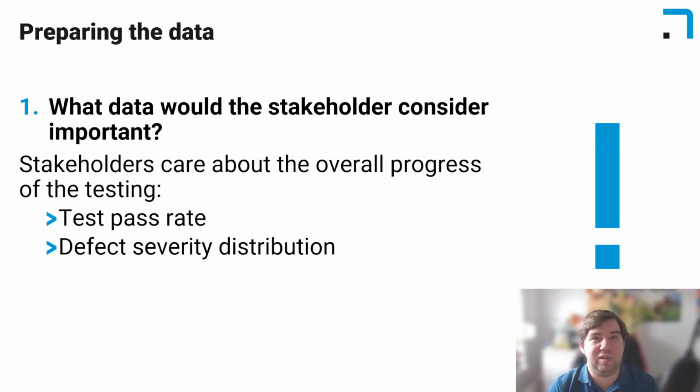Where are the defects located? You could have one section that has a variety of lower priority defects. It may have 20 defects, but they're all at a low priority, so we can worry about fixing those later on in the project. But we may have another section that has just a handful, maybe 2 priority 2s or 1s, really high priority defects. That takes priority. We need to resolve that now, because that can cause a lot of issues.